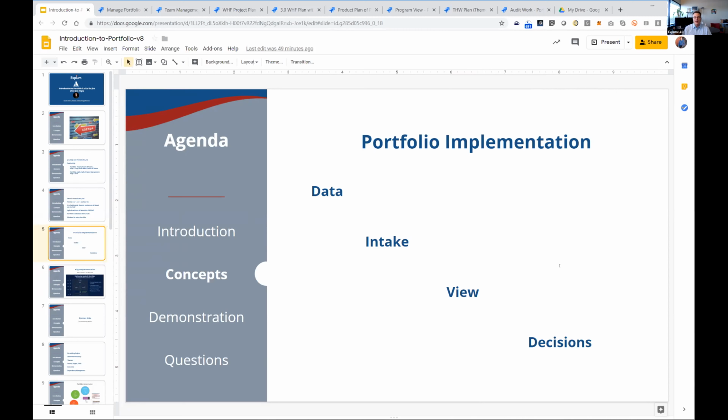You need to be able to identify what work's going to be done by different teams if portfolio is going to display that work being associated with that team's effort. So if you have 5 teams, you need to be able to differentiate in your filters or in your boards that drive portfolio between the work that will be done by each team predictively.